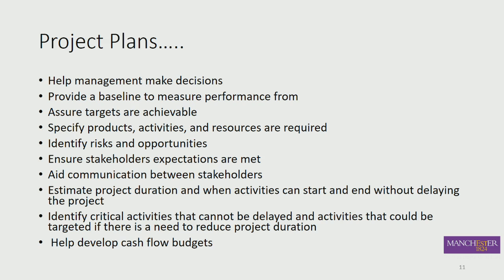One of my colleagues, at a lower level, was a factory manager, and he would be taking delivery of materials into the factory at certain times. He wouldn't let lorries come into the factory until the very specified time, let's say 2:30 in the afternoon, because if he let them in earlier, he'd have to pay them and he would lose a slight bit of money in interest. And if you aggregate all those losses over the year, it could actually be quite significant. So the timing of the cash flow is demonstrated there. He used to make them wait outside. Then he'd say, okay, you can come in now, I'll sign this, we'll pay you now at 2:30. So he saves a few hours per transaction.